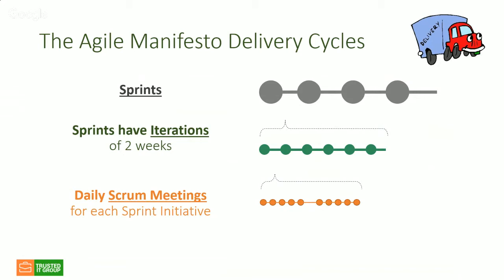Okay. So with larger sprints, let's say monthly sprints, within that one sprint you may have 2 iterations. If it's a 2-week iteration, or maybe a 1-week iteration, it's up to your particular organization to decide the length of that iteration. But the idea is that each sprint may have multiple iterations, especially for larger sprints. That would make sense. And of course, if we drill down, we have sprints, we have iterations, and within an iteration we have daily Scrum meetings, right? Daily Scrum meetings where you ask a team what's going on, what they're working on, what are those imperatives, and what's done, not done, etc. So that's the concept that we took, and we thought that's going to really be applicable to most of the agile organizations.